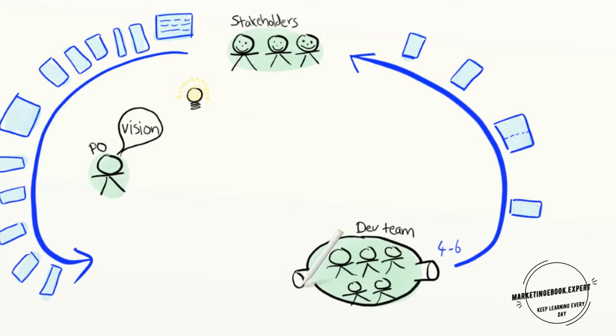We'll get overflow. Suppose the team starts working on 10 new stories per week. If the input is 10 and the output is 4 to 6, the team will get overloaded. That will cause multitasking, demotivation, and all kinds of bad stuff, and ultimately it'll lower output and lower quality. It's a lose-lose proposition. It's kind of like trying to shove more paper into a printer to make it print faster, or shoving more cars onto an already crammed highway system. It just doesn't work. It just makes things worse. So what do we do about this?